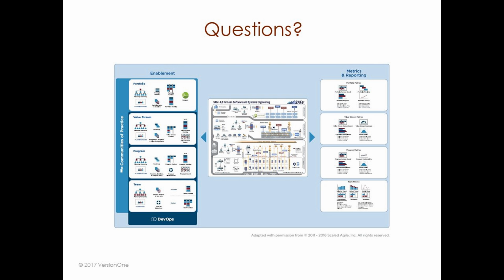So I might say, we think the last feature about this size took 120 story points, so I would put a rough order of magnitude SWAG of the feature of 120 SWAG points, and then I know that when I build up my stories into there, when I get to 120, I'm about done, or I should be about done for that. So that's really how I see it used mostly, is before we know the stories, to give us an ability to do some capacity planning at a feature level.